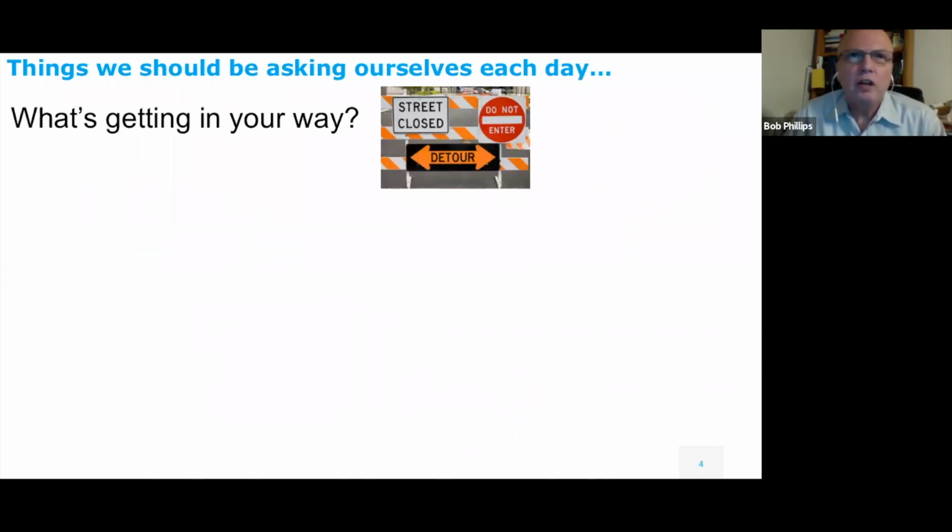If you find the meeting taking a little bit longer, you need to set the conversations aside. You need to say, maybe we should talk about that after the daily Scrum. Then you say, okay, the daily Scrum's over, and if you have a 6 to maybe 10-person development team, they're free to go. Then you can have those discussions. And what you find is even with people being free, they will stay around. But at least you're not making people stay for something they might not be interested in.